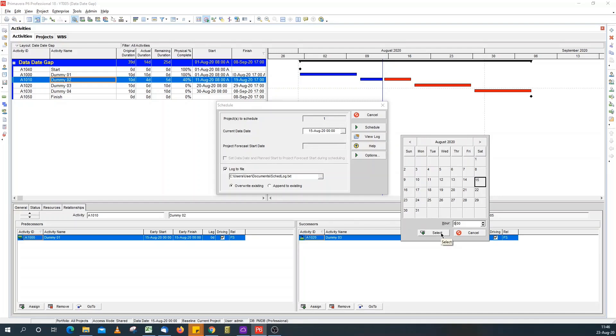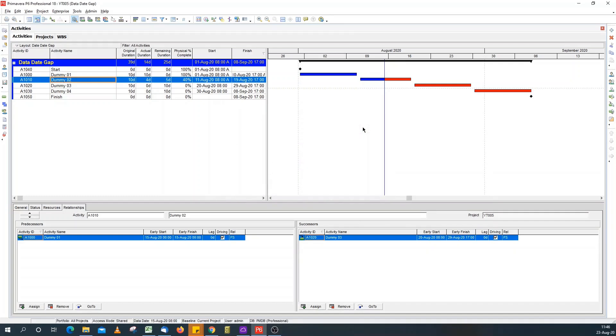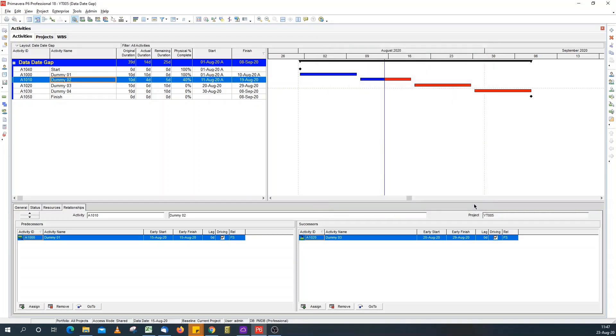So, if I select it and schedule, the gap disappears. You need to go back to user preferences and select do not show time. Now, your schedule is good to go. You can issue this.